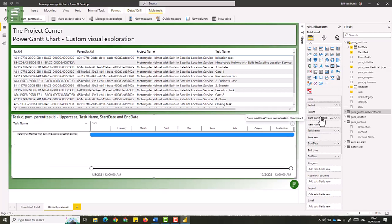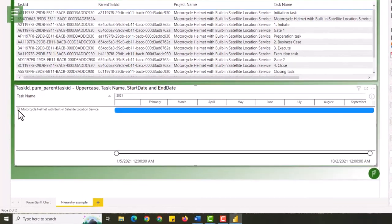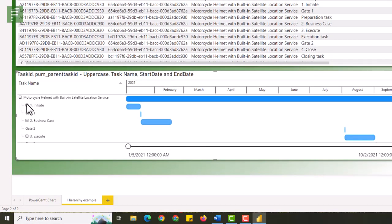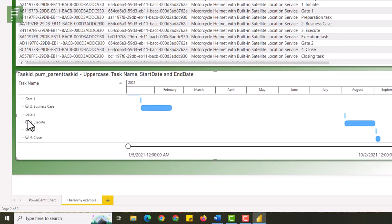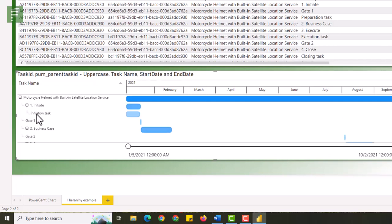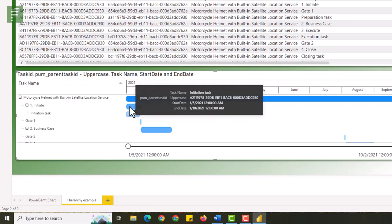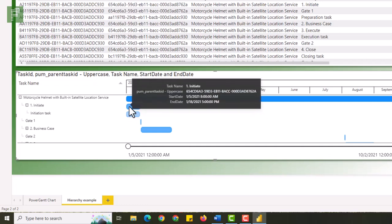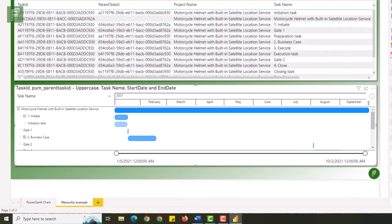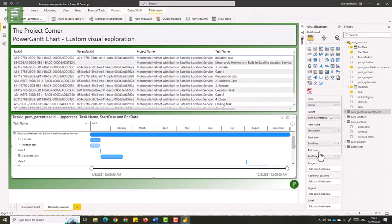And what we'll see is now we have that little plus sign here, and I can open that up. And we'll see that there is an initiative, there's a gate, there's a business case, and there's a gate, and there's execution, and probably another gate. If I open that up, there's an execution task. If I go back to the initiative, and I open that one up, I can see that it's a lighter color of the original top level task. So that's everything related to the columns that you can add to this visual.